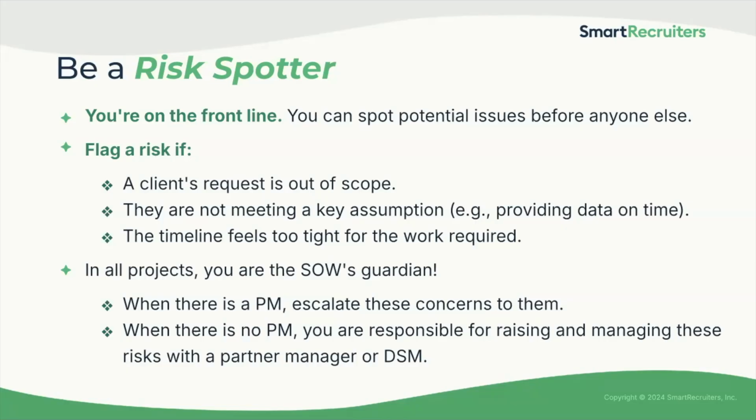In all projects, you are the guardian of the statement of work. This is your responsibility, and the only difference is who you escalate to. Where there is a project manager, you'll escalate these concerns to them and they will manage the formal change process. When there is no PM, you're responsible for raising and managing these risks with a partner manager or DSM.